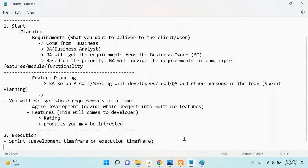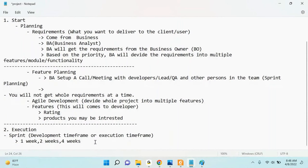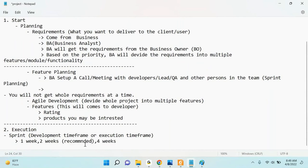A four-week sprint is also an option. Two weeks is recommended. Two weeks means 15 days. In 15 days you have four weekends, so you have only 10 working days. For example, if our sprint starts from a Thursday, we work through and deliver on the 21st - that's our timeframe. In our organization we follow two-week sprints, removing four days, giving us 10 working days.